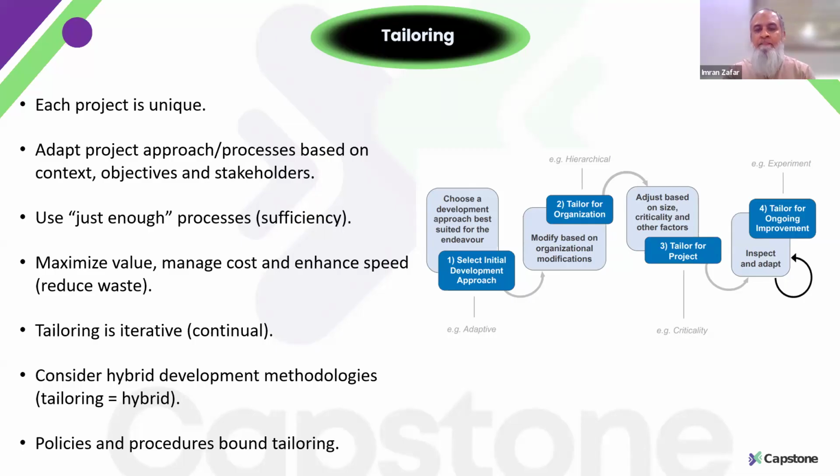As we have seen as well, in predictive there are a lot of documents, stuff like RACI matrix, issue log, risk register, change control mechanism, ten plans, and maybe thirty-plus project documents. We have the three baselines. All these things we have not seen in agile or adaptive methodology.